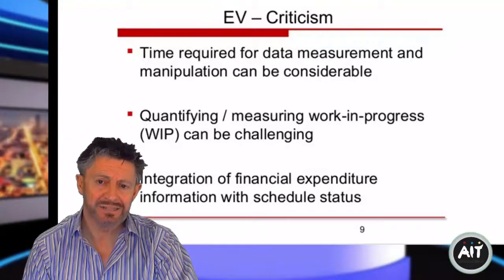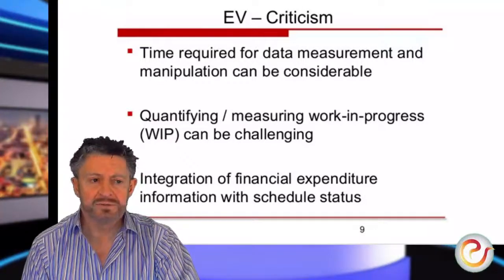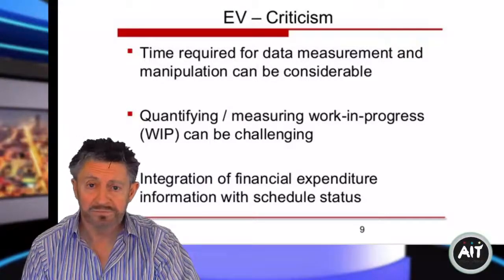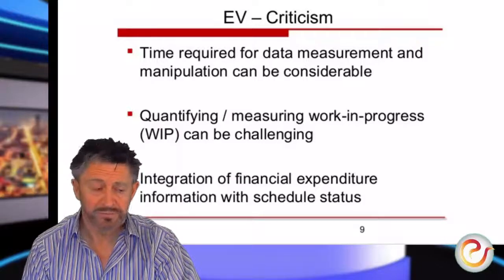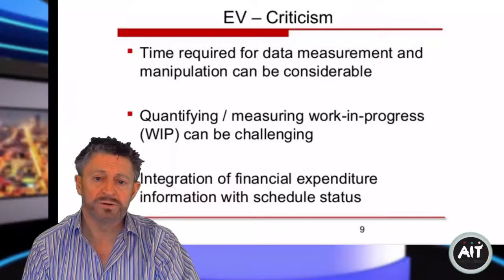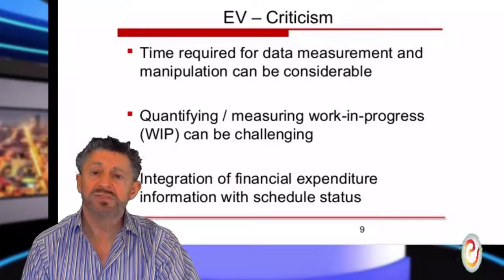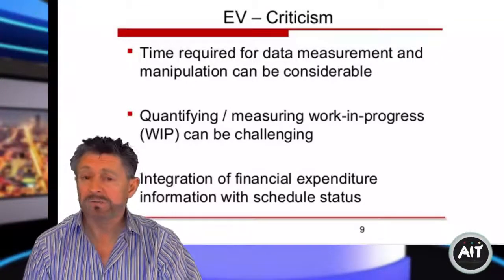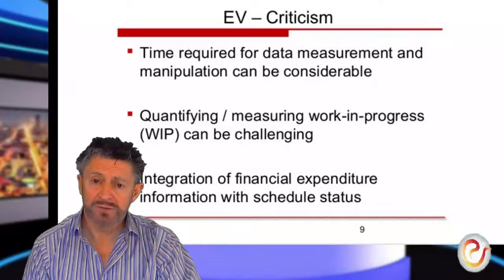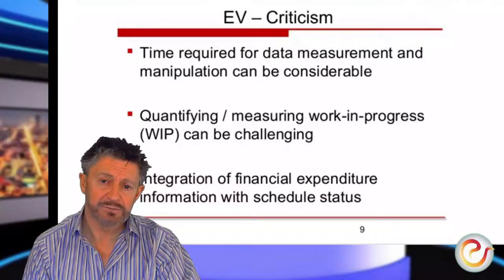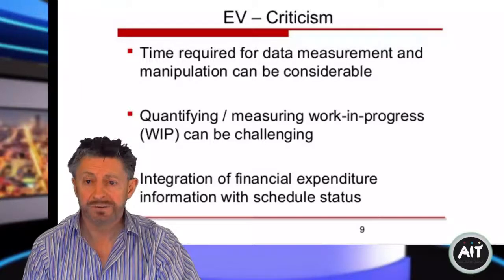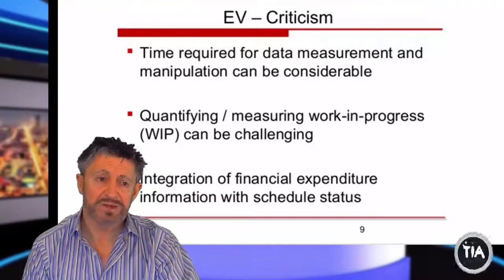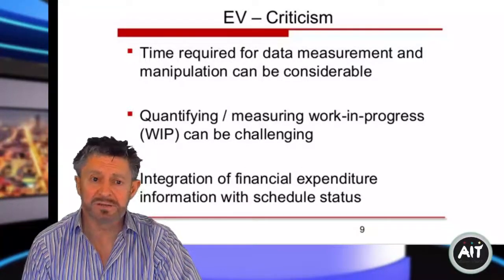Can you get that information easily enough? Well, for example, you can make an extrapolation. You don't need to have a clock on the equipment to say how long that machine was being used. So if Mark works on the machine for 1 hour 25 minutes, then you say the machine is going to be worked on for 1 hour 25 minutes. Or you might already know that Mark needs to spend 1 hour on the machine. It takes 15 minutes to set up the machine and 15 minutes to clear down the machine when I've done my task. Therefore, it's an hour and a half of machine time and an hour and a half of my time, because I have to set it up and then clear it down.